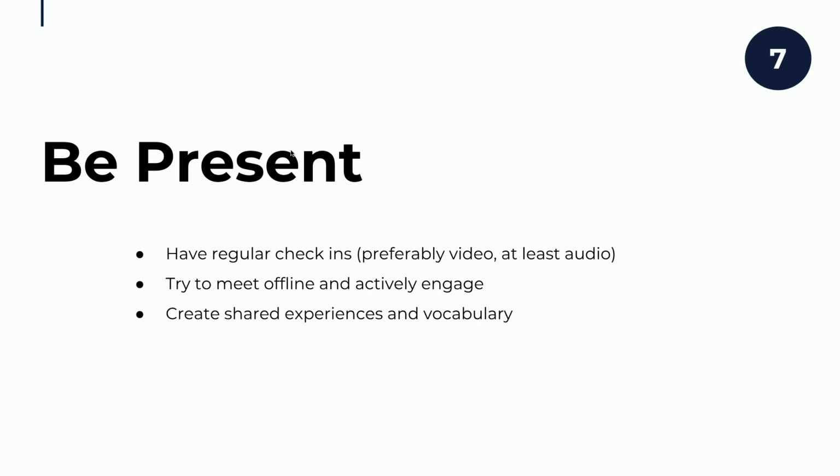But there's a couple of core tools that we use. The number one for team collaboration and communication is Slack. There we organize a lot of things in a very specific way. For different projects we have a dev channel, a design channel, an account channel, a client channel. So we try to focus the conversation on various topics, so that we keep the people involved in a specific role concentrated around that communication.